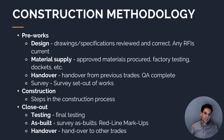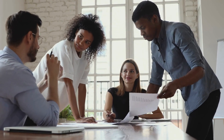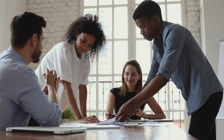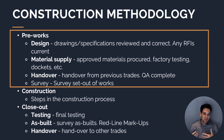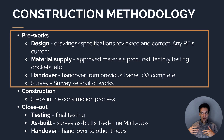Regardless of the specific construction activity, there are some broad steps that any construction works will follow. I like to think of these as pre-works — the stuff we do before starting the construction activity — the actual construction activity, and then the closeout activity. Pre-works include design checks: verifying drawings and specifications are correct, approving shop drawings from suppliers, buying materials and checking they match specifications, and receiving handovers from previous trades — for example, checking that conduits are free from debris.